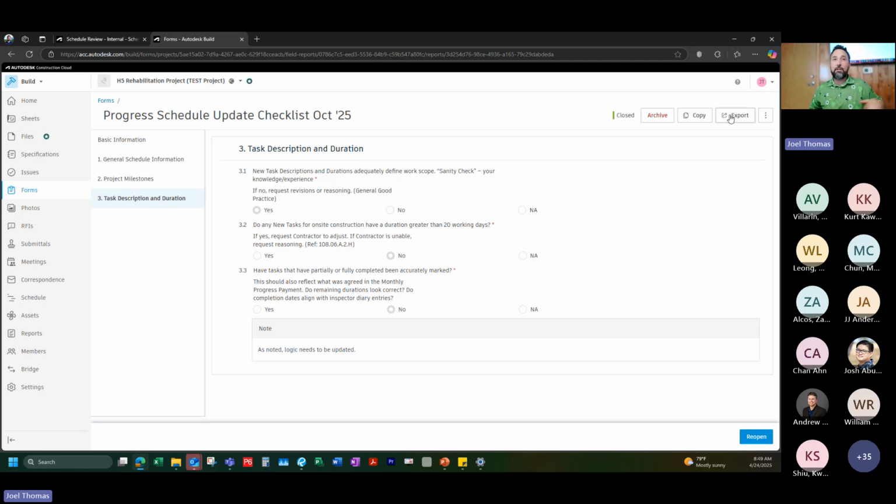So for this particular contract, this is a calendar day. I was just trying to keep it simple. A lot of contracts are calendar day that I see, but then it gets a little bit weird with the working days, where you can only work Monday through Friday, but it's a calendar day contract, and your traffic control probably only allows that. Just to keep it simple for this example, I'm using calendar day so I don't have to worry about, oh, this falls on a Sunday. I'm pretending that our contractor can just work through all of it.